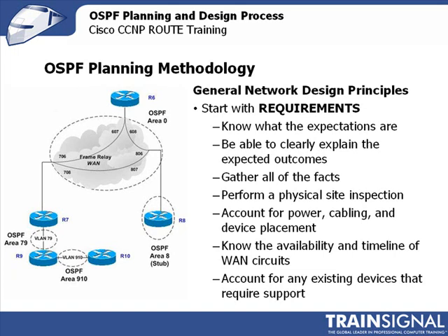Make sure you gather all of the facts. Know what is where and how things are configured and how things might need to be disposed of, for instance, older equipment, what's in use now, and so forth. Always perform a physical site inspection. I have had numerous personal nightmares where, because a job did not have a site inspection, all kinds of unpleasant surprises were had. In project management, just in general, the principle is to make sure to take whatever is unknown and make it known, and doing a site inspection helps with that.